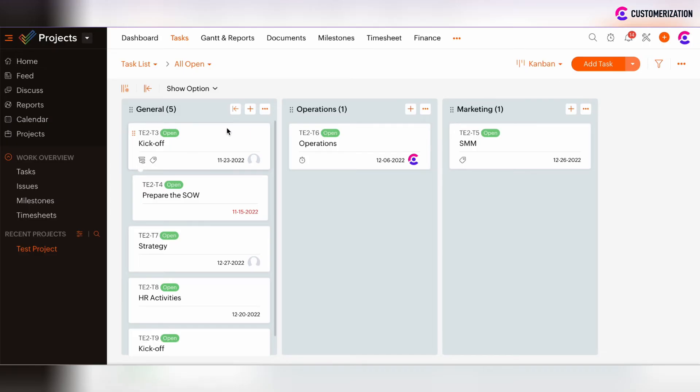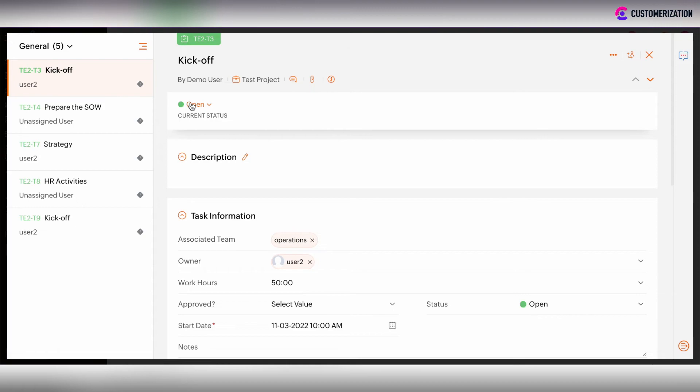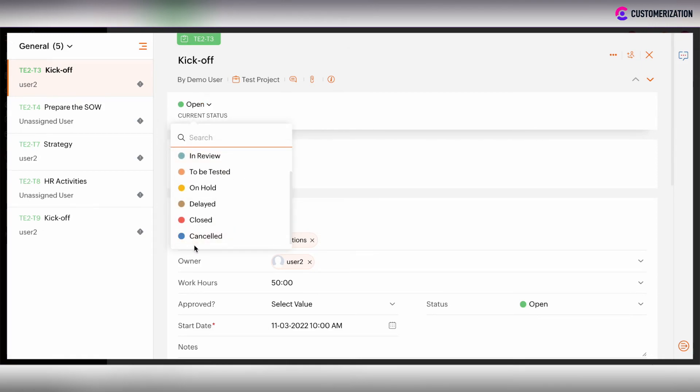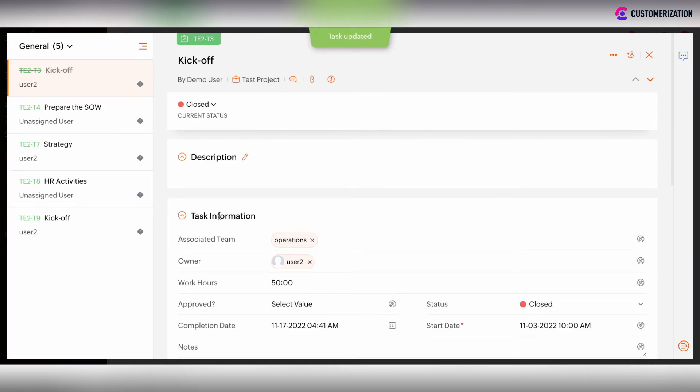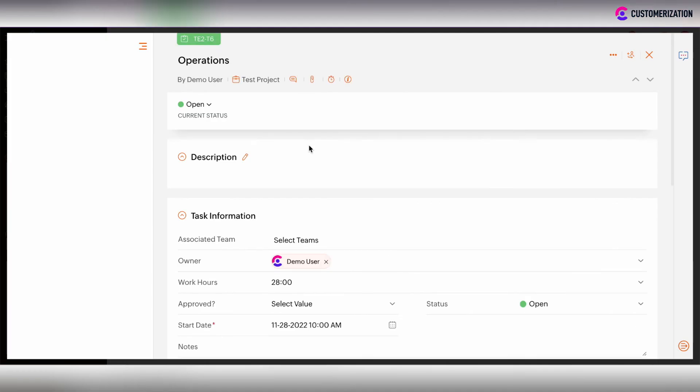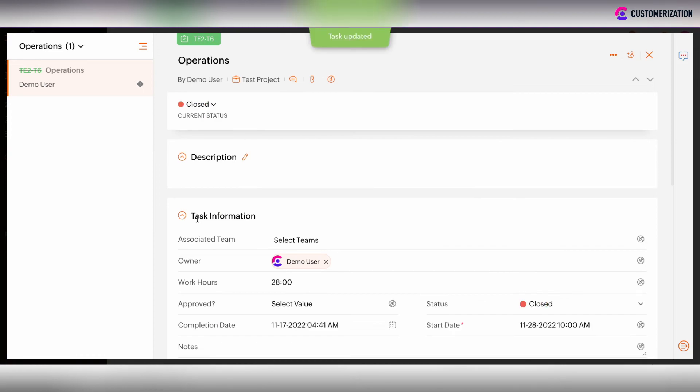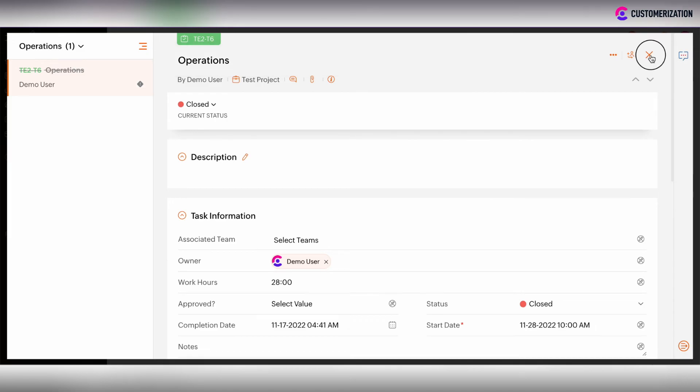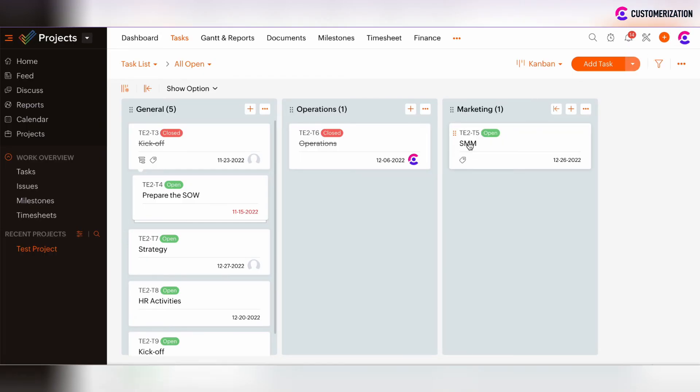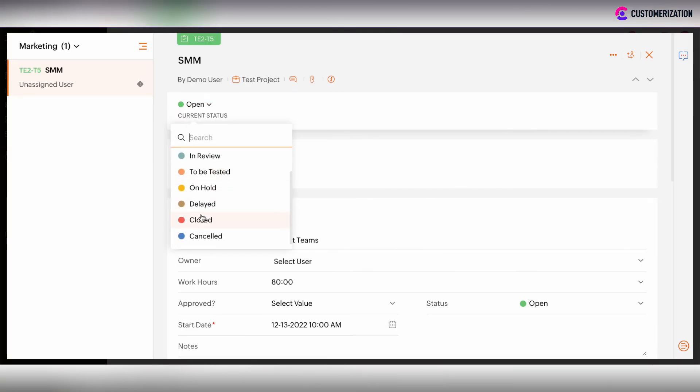Okay, then I can close the kickoff. After that, the operations task can also be closed. As you see, the system gave us the possibility to close the operations. The same thing with SMM.